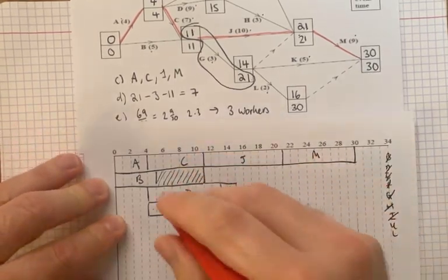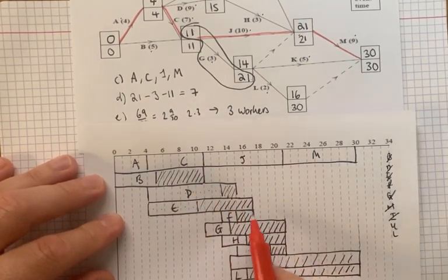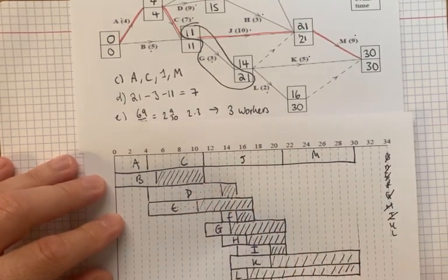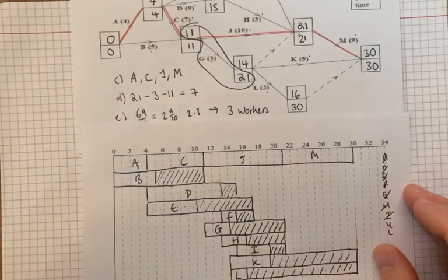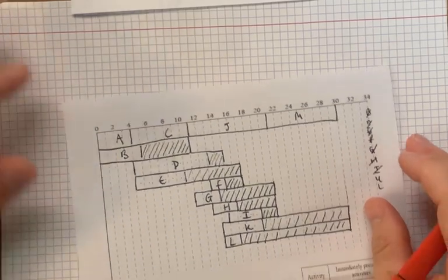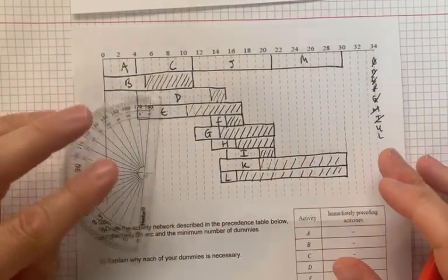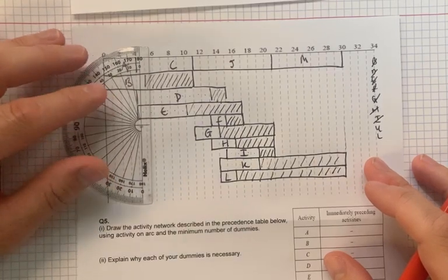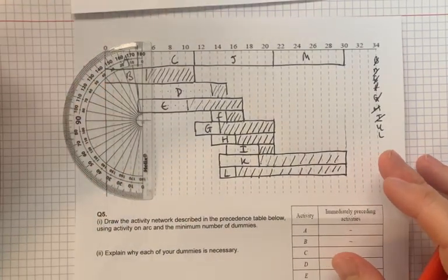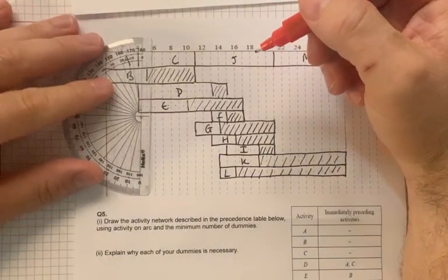You can see you've got a lot of float. So when it talks about in part A total float, it would be all of these boxes added together, which is quite a lot for a project. Now, it's not part of this question, but if you remember, I talked about the lower bound before, and if you wanted to work out a lower bound from a Gantt chart, what you're trying to do here is pick a time where you've got more critical activities occurring.